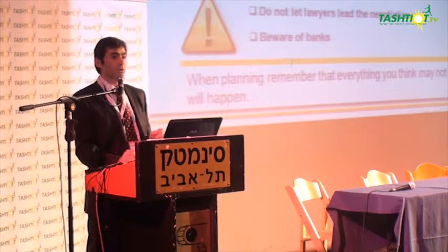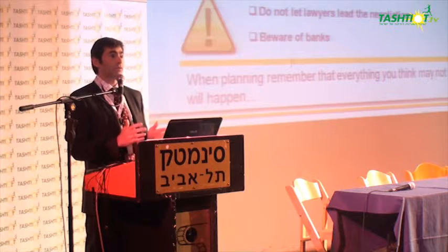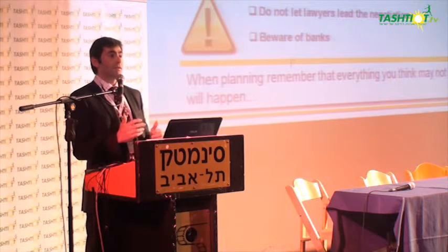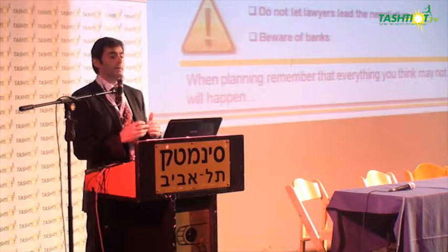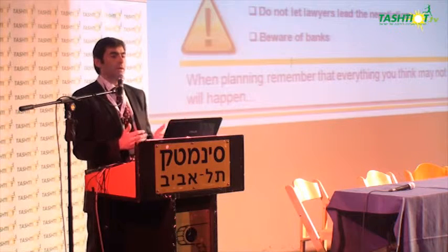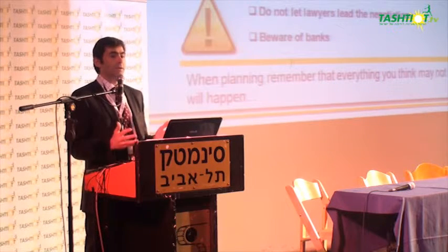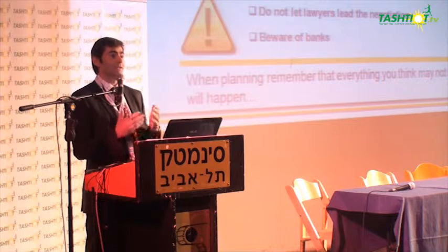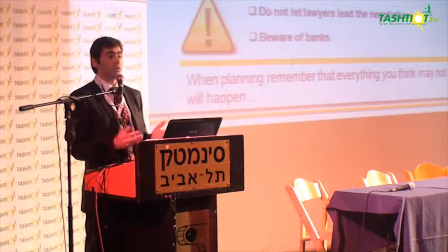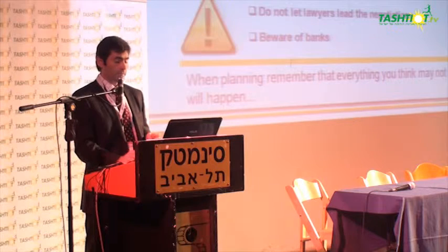And you have also to make sure, as a client, that your EPC contractor is bankable. Because even if you don't think that you're going to need project finance now, you may need it later. And if the guy doesn't have a big balance sheet and doesn't have a lot of experience and is not acceptable to the banks, you will never be able to do the project finance.